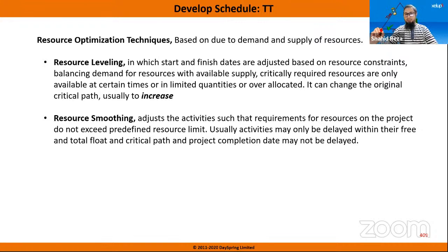Because whenever a resource is attached to a task, any software thinks that resource is mandatory for the task. So when the resource becomes available, that task generally shifts to that free time of that resource. That's why the time increases.